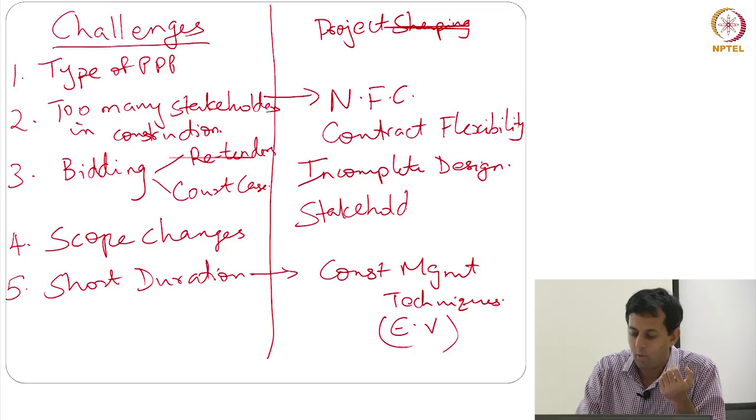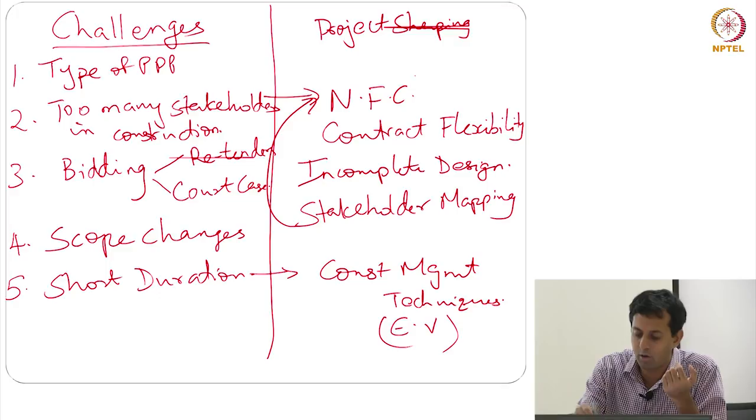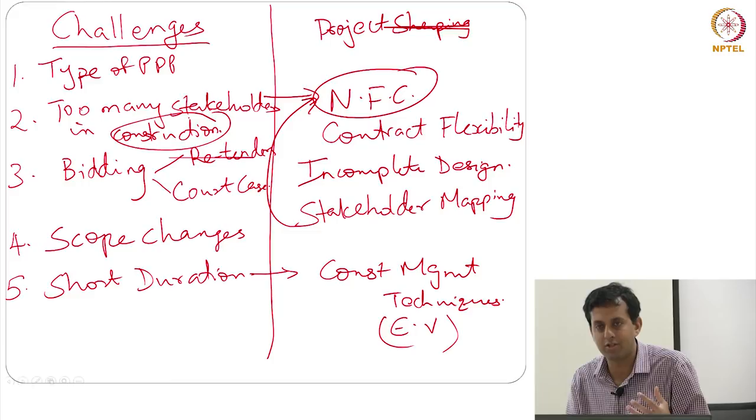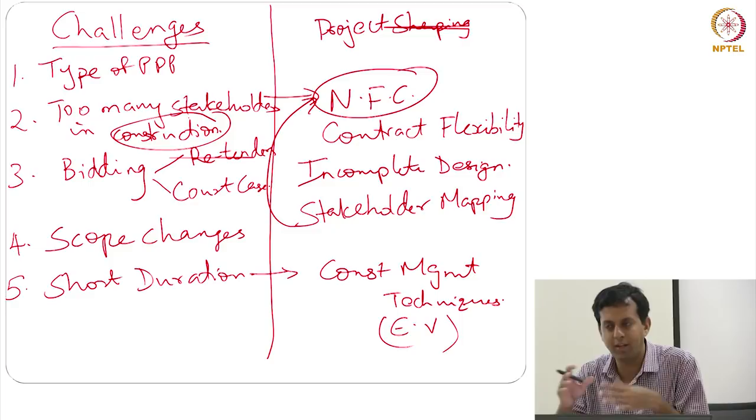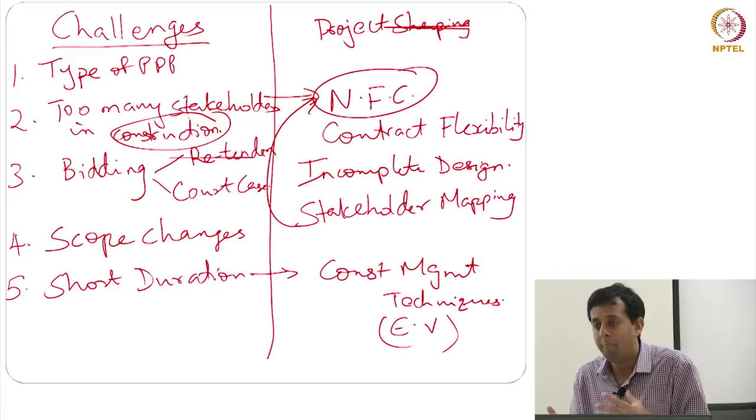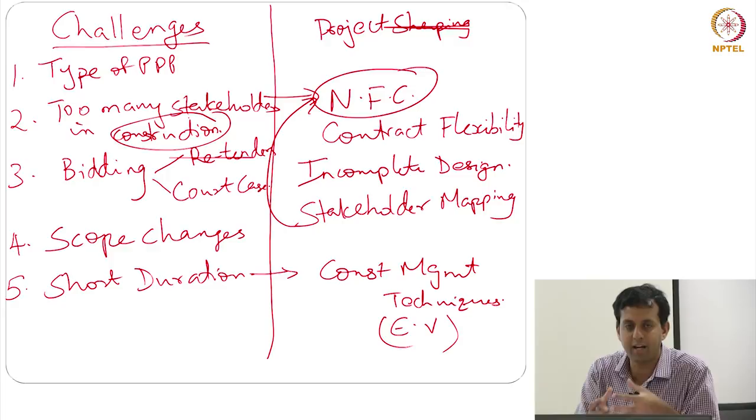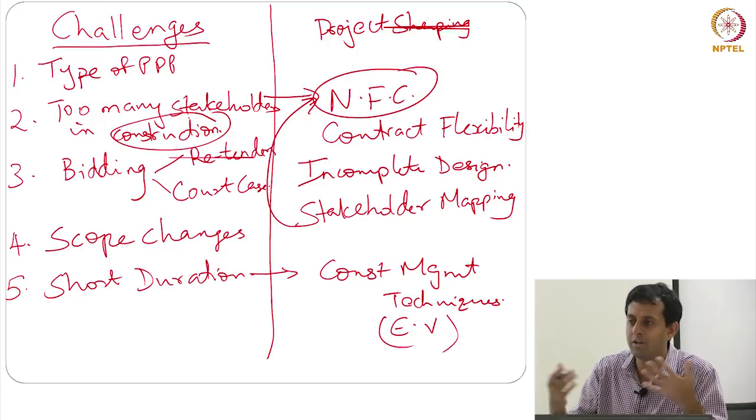But the other thing that I feel could have been added in was the whole stakeholder mapping element. What they've done is a really good job of mapping the stakeholders during construction. They mapped out the stakeholders in construction, they identified who those people were, and they've brought them to the table, and they've created that committee, right? So whether they used a power interest matrix or whatever, we don't really know, but they've done a good job mapping those. But they've left out a lot of the non-construction stakeholders, like the CAG, like ERA, etc., who are now starting to create issues later on, right? So in terms of doing these kinds of facilitation committees, one possibility is that they should have tried to filter in a strategy for some of these other stakeholders as well, and therefore the project stakeholder mapping probably needed to be a bit broader.